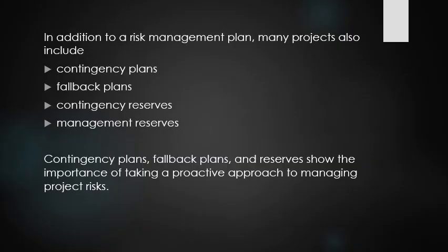Contingency plans are predefined actions. The fallback plans are developed for risks that have high impact on meeting project objectives. Contingency reserves are funds included in the cost baseline that can be used to mitigate cost. Management reserves are funds that are held for unknown risks.